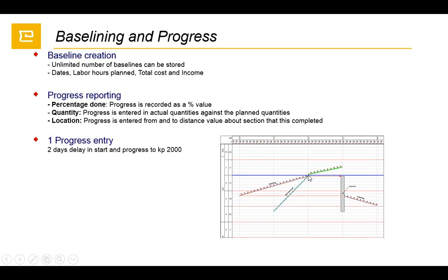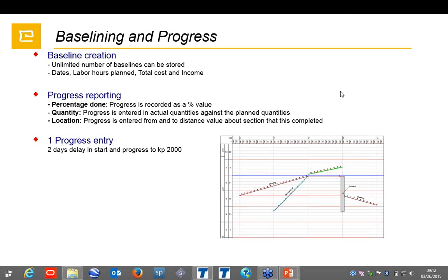So this is good for claiming works as well. If you don't have access to site, you can exactly claim why and where you started the works, where you completed. It is all recorded in the system. Later you can find these records in the system for claiming purposes.